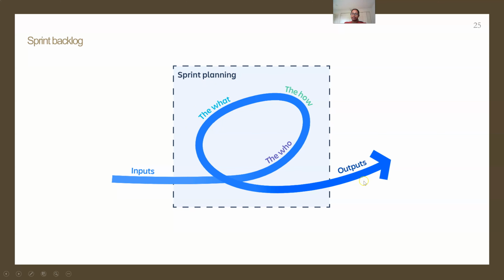So in Agile metrics, you can see that this is an example of a sprint burn down chart. Initially, when the sprint started, the burn down was high, or the story points were high, and eventually, once the features are implemented, the effort reduces slowly. The next is epic and release burn down. This is the concept of sprint, how we have burn downs.